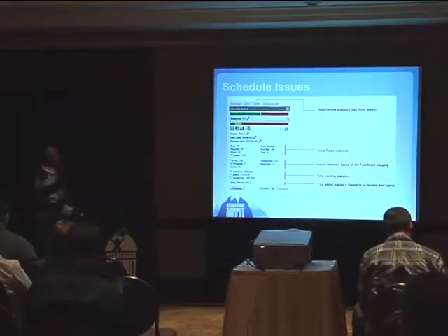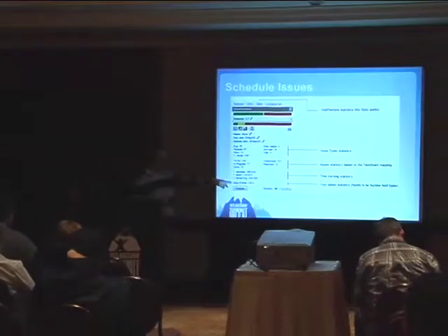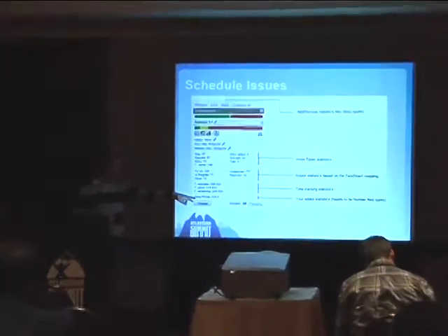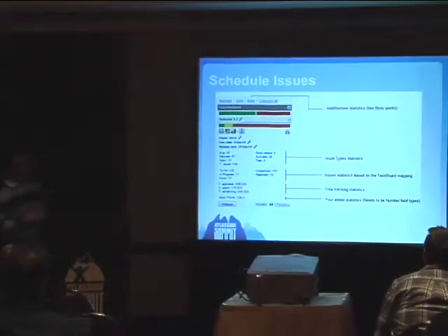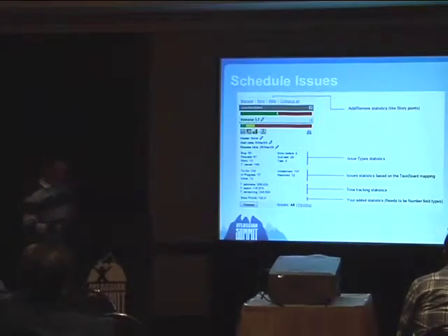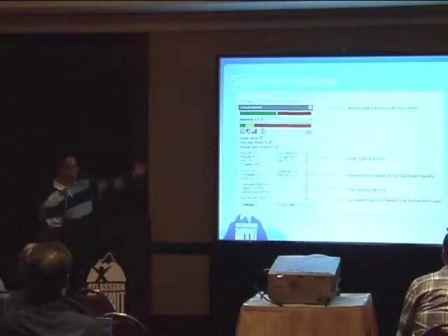And here what you see is basically the basic statistics that we provide. You can add your own statistics directly in the column. So here, for instance, if you want to support an agile team, you can add a statistic called story point. But you can add whatever number field that you want to track. And of course, you have your total estimate, total time spent, and remaining.